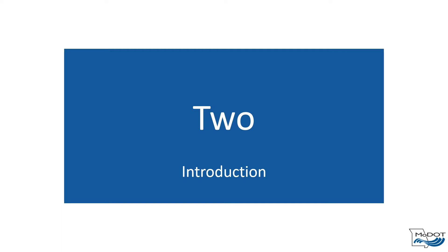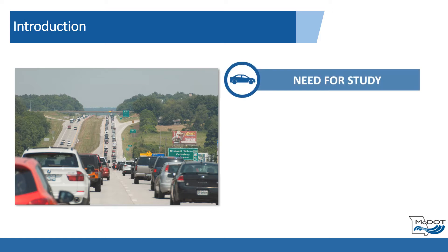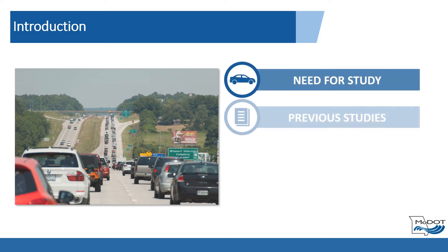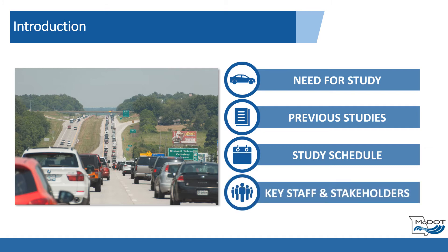Now that we've discussed stakeholder acceptance, let's introduce the Methods and Assumptions report. Section 2 is meant to provide background information on the location of the project, factors driving the need for the project, project history and previous studies, a high-level schedule with major deliverables identified, and the project team.